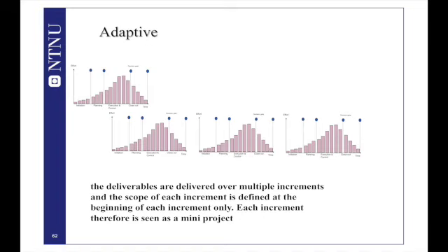Therefore, each interval or each piece of work is to be seen as a project or a mini project. This type of work reduces the uncertainty. As you know, it is one thing to look 2 years in the future, and totally another thing to look 1 month in the future.